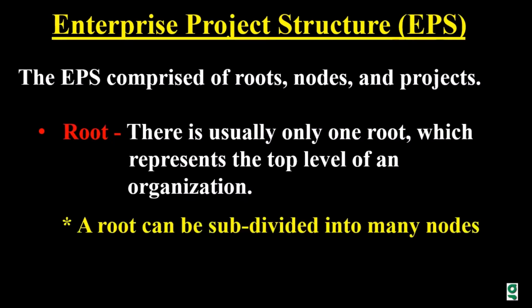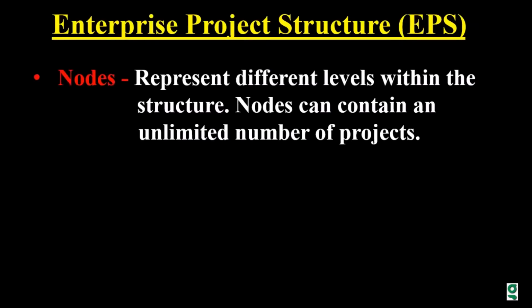Also, you need to know that a root can be subdivided into many nodes. Nodes represent different levels within the structure, and nodes can contain an unlimited number of projects. In other words, this is where the projects will be stored. So the projects are usually stored in the nodes.